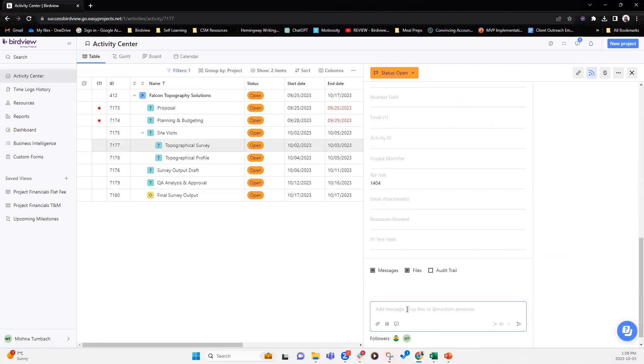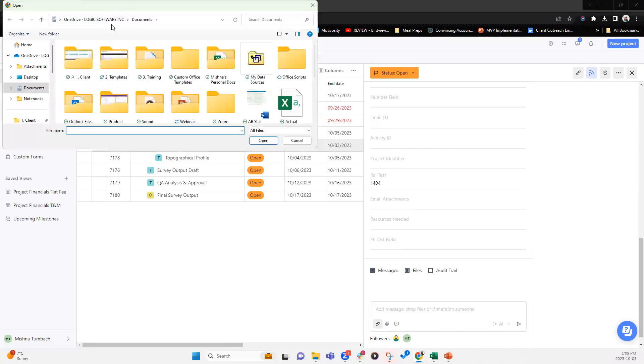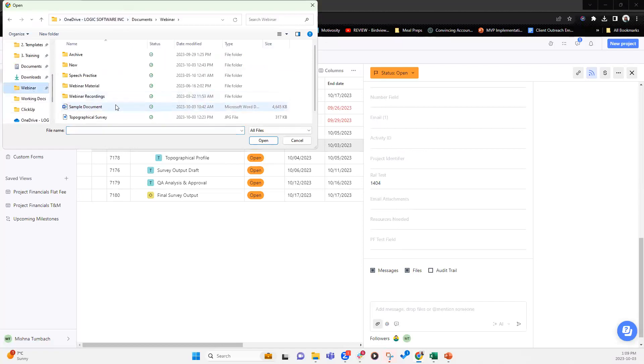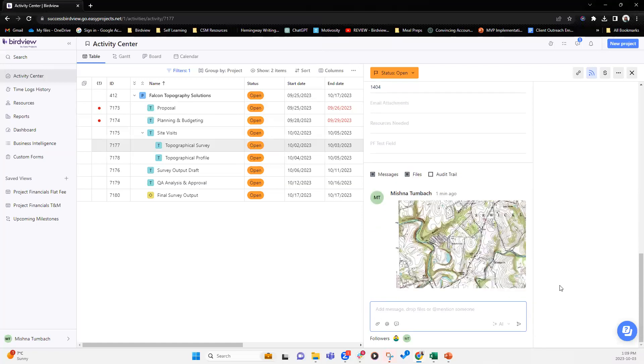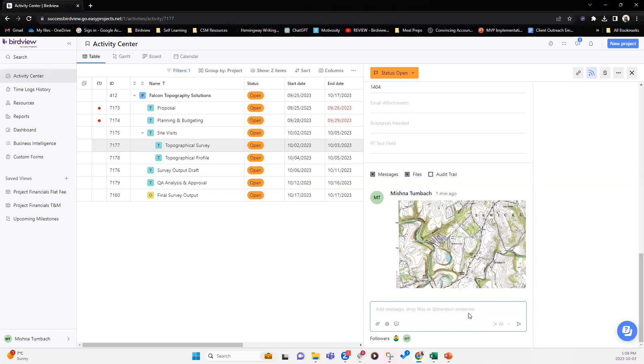In this case, let's click on topography survey here and details. So if I want to add a file here, I can simply click on the collaboration board and I can click on attach file and it will open up a new dialog box for me. And here I can choose the file that I need. So in this case, I'm going to say the topographical survey and attach and hit send. So now you can see that the image has been shared at the activity level here. And anybody who is a member of this activity, they will get a notification that something was updated here. You can pretty much add any type of file, you can add a Word document, PDF, images, PowerPoint presentations, etc. You name it and they can be attached here.